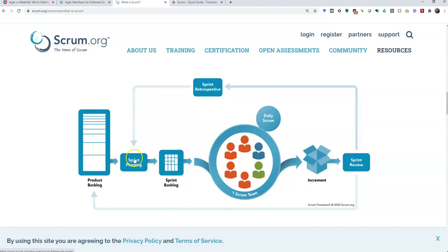But the idea is that once the sprint's planned, you create items, usually items from the backlog will be incorporated here. So we're going to do this thing, this thing, this thing, in this planning meeting with the whole team. These are the items we're going to do. And then the team will figure out who does what. Because another idea about a Scrum team, meaning the programmers who are writing the code, not the Scrum Master, not the product owner, though they might be involved to some extent, is that the team figures it out. It's called self-organizing. They figure out who's best to do what.